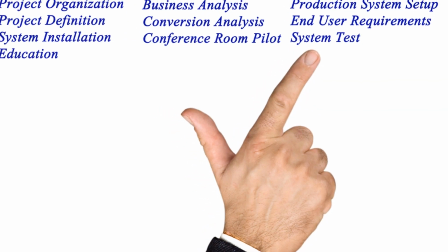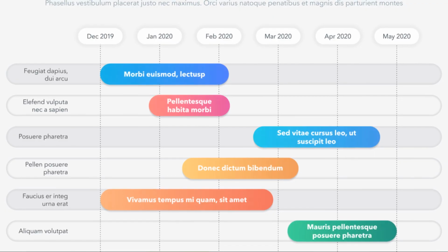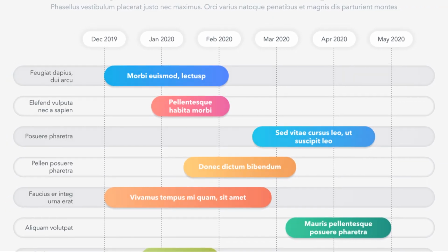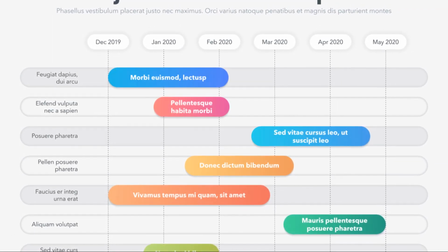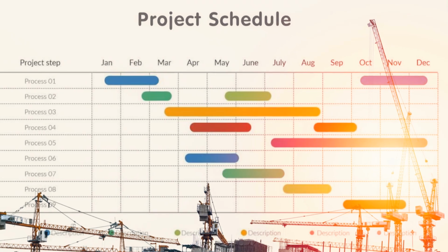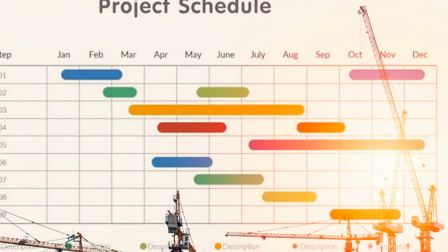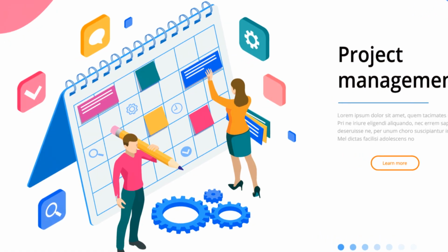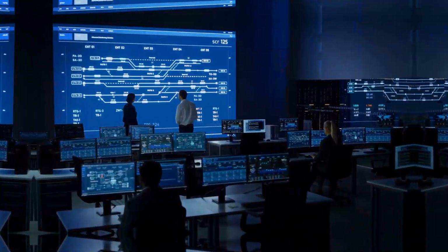Network diagrams like PERT or PDM charts visually represent activities and dependencies. Calculating earliest and latest start-finish times reveals the critical path with zero float. Understanding CPM is crucial for effective project scheduling and analysis.